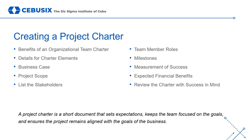A Project Charter, or Team Charter, is a short document that includes information about the team and what they plan to accomplish. The purpose of the charter is to set expectations that can be agreed upon by the team as well as the sponsor or executive leaders, keep the team focused on the goal, ensure the project remains aligned with the goals of the business, and documents the fact that control of a process is being moved from a business executive or manager to a Six Sigma team project.